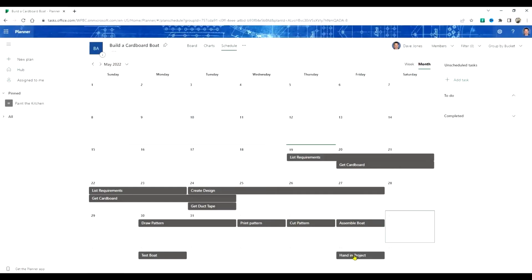Where's that final task? Everything has to be finished before this task happens. If anything is going to run late, you may have to adjust your work estimates on some of the prior tasks so that the work lines up and finishes before this task.